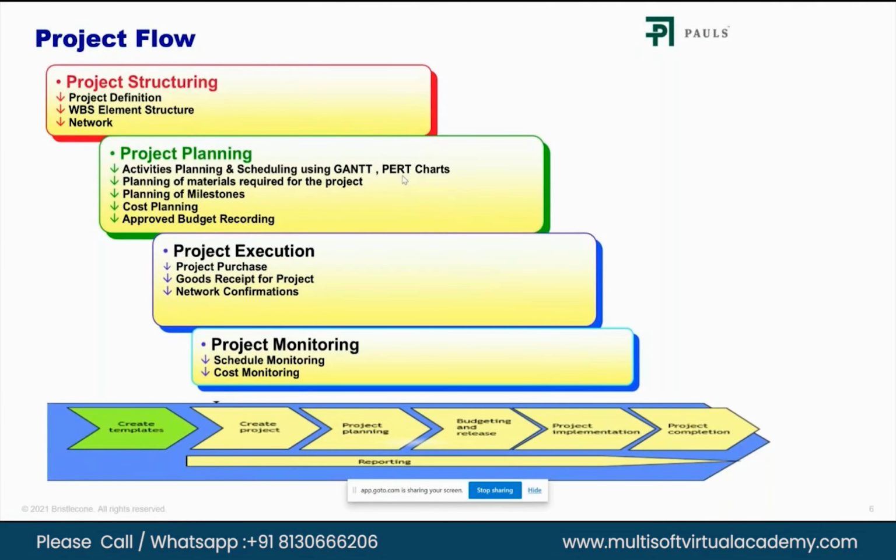We might start from the launch of the project, then land acquisition, then having approval from the government authority to start the project, then having NOCs from environmental departments and forest departments would be one such WBS. Then doing design and drawings of these buildings would be one such work breakdown structure.